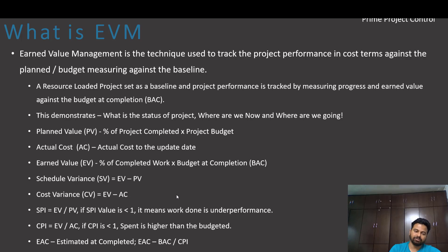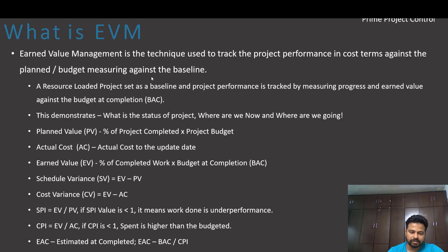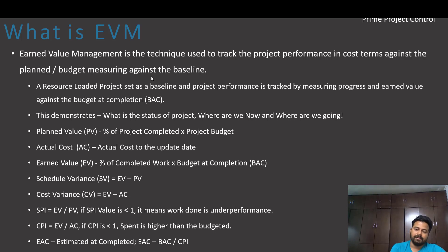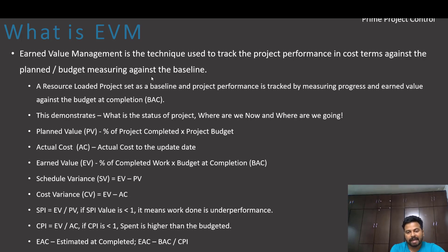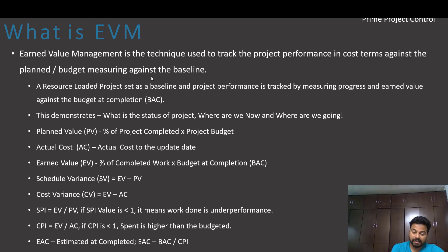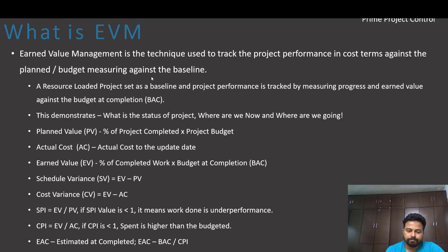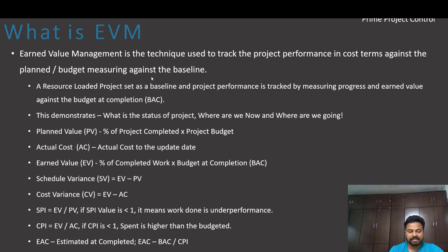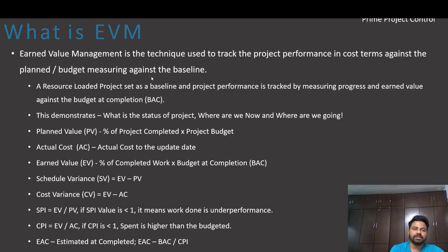SPI, EV divided by PV, is schedule performance index. If SPI value is less than 1, then it's underperforming. We have to make sure it's more than 1. Earned value divided by planned value should be equal to 1 or more than 1 to be a healthy project. CPI, cost performance index, is EV divided by AC. If CPI is less than 1, it means spent value is higher than the budget or planned value. We have to make sure these SPI and CPI are not less than 1, or if it is less than 1, we need to have mitigatory measures and control over the project to make sure the project is beneficial to the stakeholders.